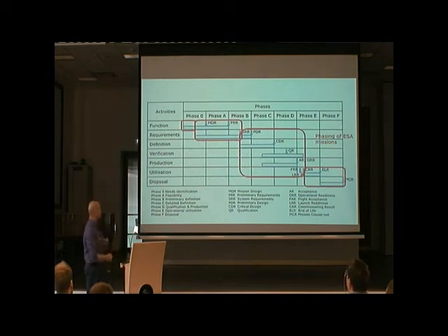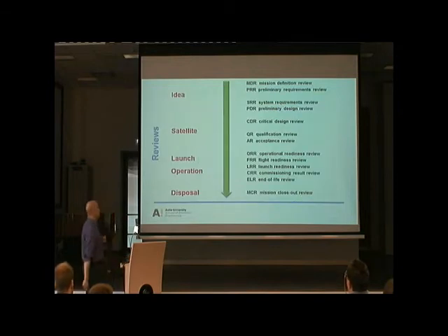So these phases, if you start to build your mission, you start to maybe work with this kind of Gantt chart, where you make the different phases on one paper. And as you see here, there are arrows in between two phases, and these are called reviews. In a typical space project, you have a lot of milestones which are called reviews. Reviews are a really good idea. Reviews end a certain part of the project or project phase, and you go into a review.